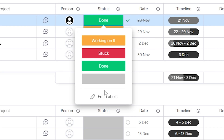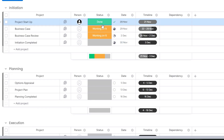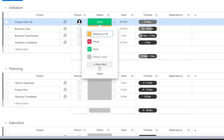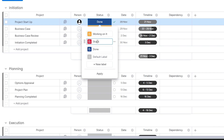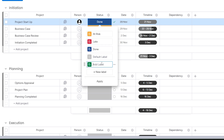Stop the clock. Before we go any further, I have a gripe — something that bugs me about Monday.com. You see how it uses the green indicator in status to tell us something's done? Everywhere I've ever worked uses green to say you're on track, not complete. You can change that by clicking on any task status and selecting 'edit labels.' But be really careful — these buttons have functions attached to them. Don't create a new colour for done. Instead, turn the existing one from green to a different colour, then add a new colour for green to represent 'on track.' Feel free to rename the labels as you need. OK, restart the clock.